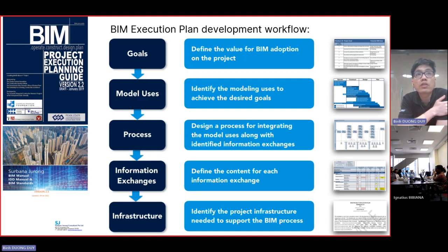If you're currently working on NEOM, you may have to read that communication plan when you first join the project. The communication plan covers the planning, the timeline for submissions, the process you need to follow, what information formats you need to exchange, and the infrastructure for the IT system and software you are able to use.